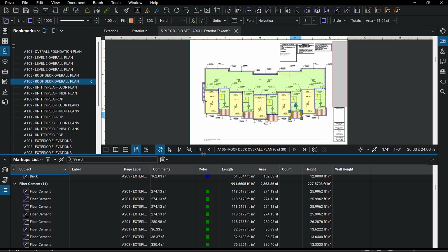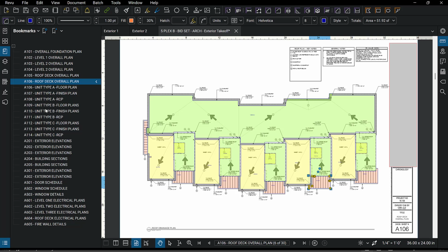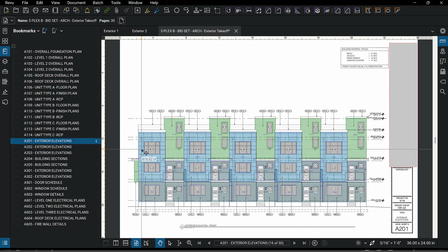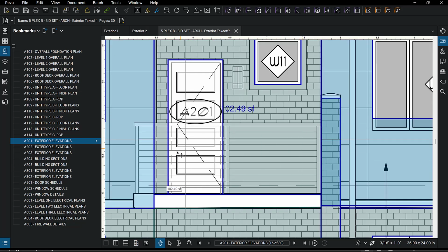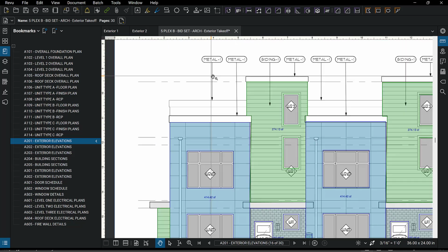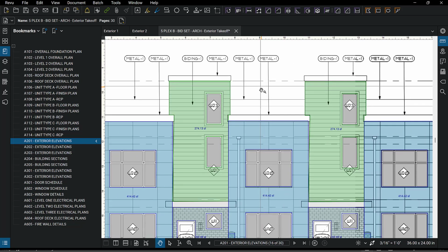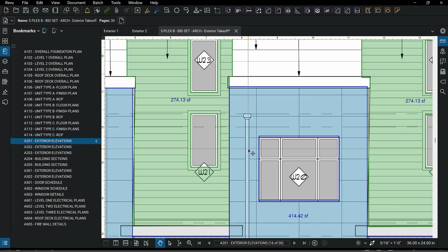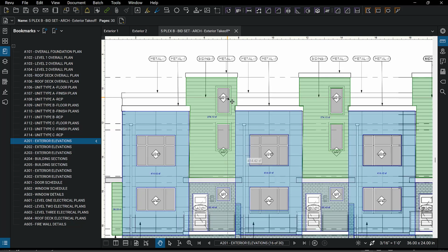All those things that we were looking at as we went through the drawings that you should have become familiar with as you're doing your takeoff. We didn't do a specific takeoff to try and do guardrail right here. We never took them off, and we never did the metal cap takeoff or quantity. But those are elements within the scope, like the gutter right there.